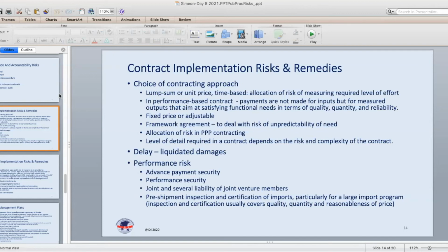In that type of situation, it may be that a unit price contract is the most appropriate one from a risk mitigation point of view, including the risk that if the bidder is given an inordinate amount of the risk to bear, that additional risk will be calculated by the bidder in terms of a higher bid price.